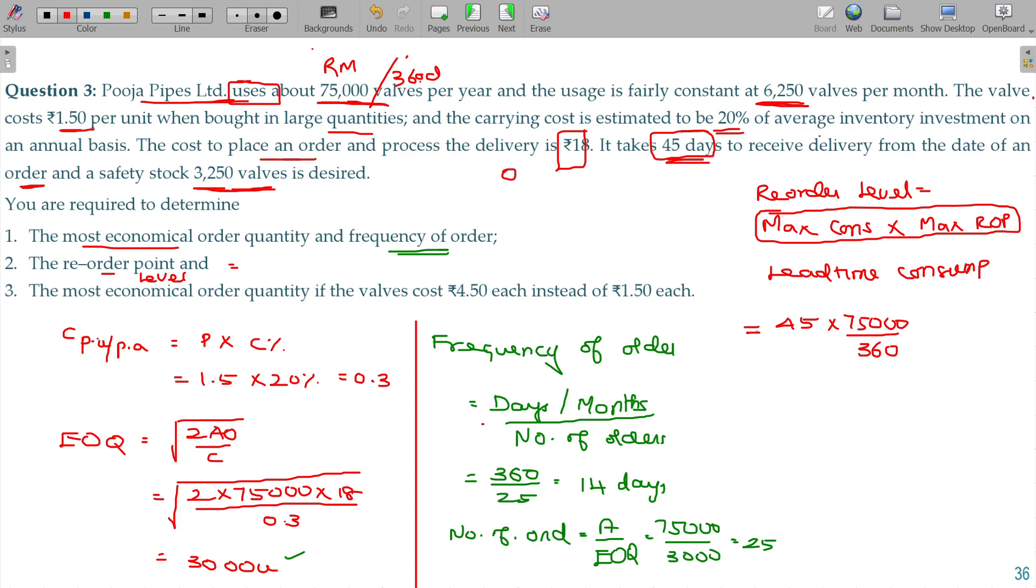What I do is maintain a commodity that will be called safety stock. We will add to the lead time consumption - add safety stock. Here the safety stock to be maintained is 3,250 valves.